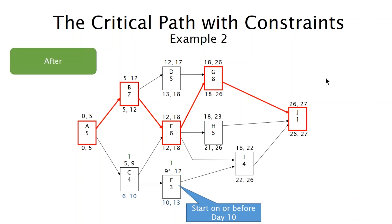Quick note here from Laura, can I use a hard constraint on a contract finished milestone to analyze my schedule risks and mitigate those logic issues by modifying activity duration or resource usage? Absolutely. If you want to use hard constraints strictly for analysis, then absolutely. I have no problem with that. Although you don't want to leave them on your schedule permanently.